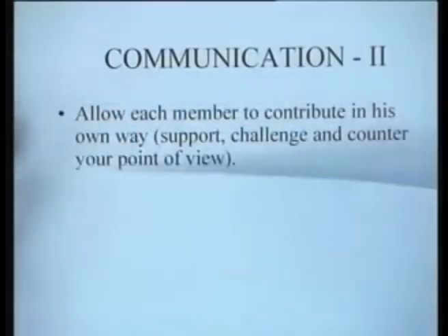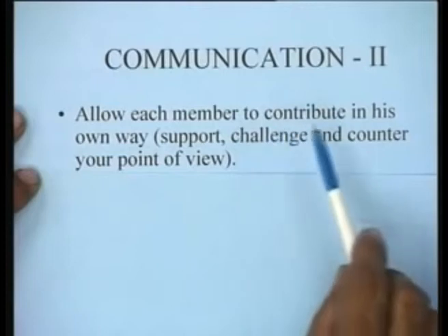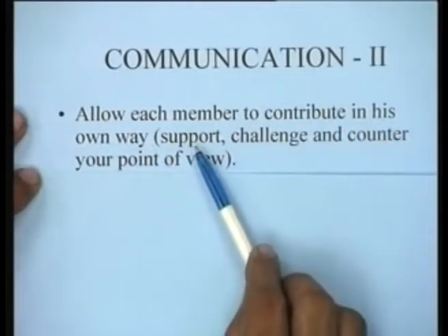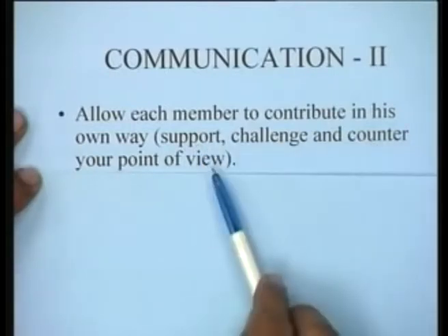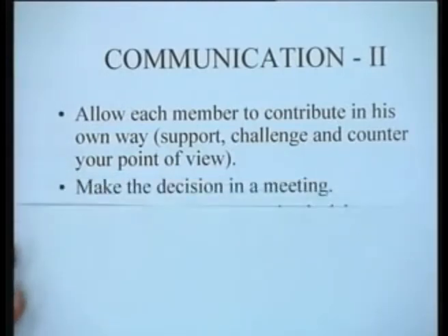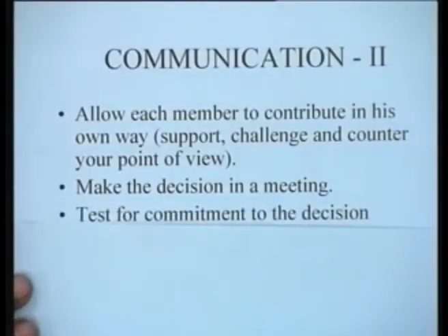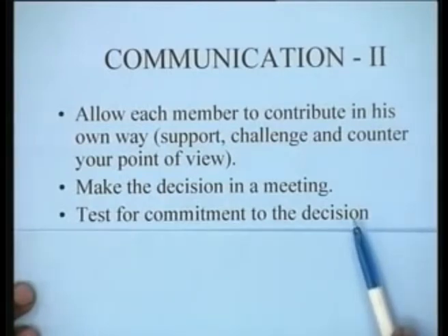Communication, therefore, how can it be done? Allow each member of the team to contribute in his own way, and remember that the contribution could be either by supporting or challenging or countering your point of view. This is important, so all these people are then making contributions. Make the decision in a meeting. Whatever decisions you have to take, that this will be done or that will be done, it should preferably be done in a meeting, and in the meeting you can also test for the commitment to the decision.